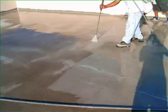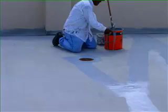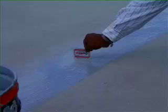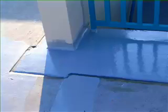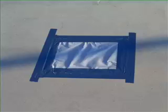We then prepare the entire surface for the waterproofing membrane to come. We pressure clean to remove all latent particles and other contaminants. We then caulk all cracks by pre-striping with the base coat material. We also use a mill gauge to check for proper material thickness along the way. We're using proven Sonneborn brand sealants and the Mamico trafficable waterproofing deck system.